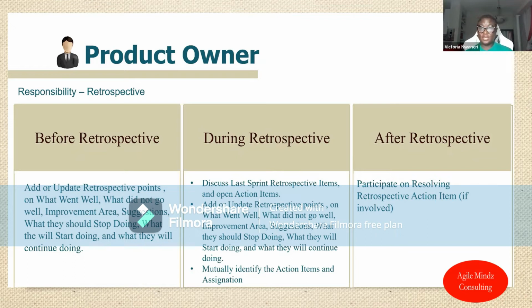And some of that feedback can be, we need better requirements, we need clearer requirements. The requirements that we do have do not have all of the acceptance criteria in them. Or the stories that we do have do not have INVEST criteria in them, or they're not well prioritized, or they still have dependencies, or they're not broken down enough. So these are things that the product owner might get.